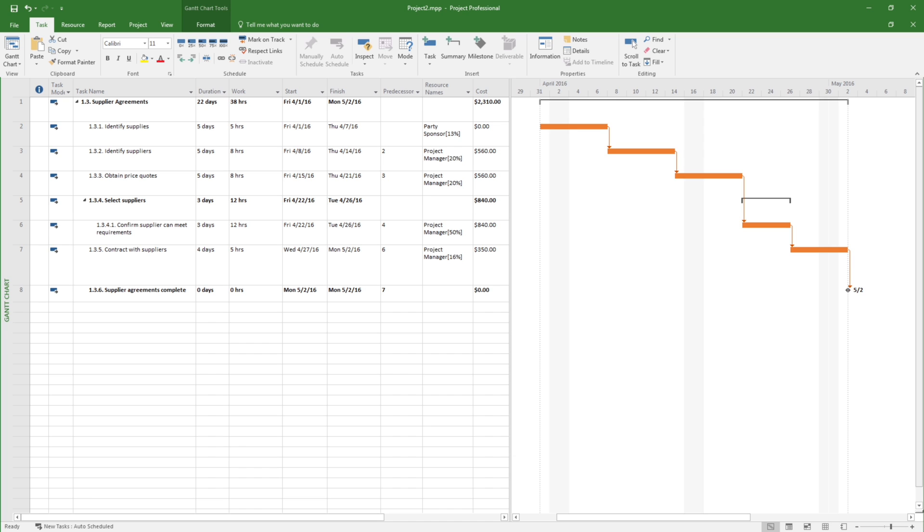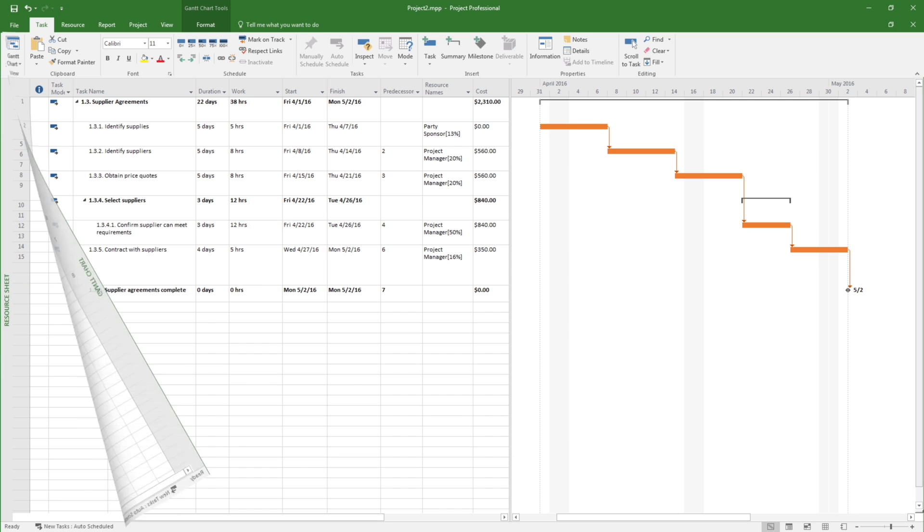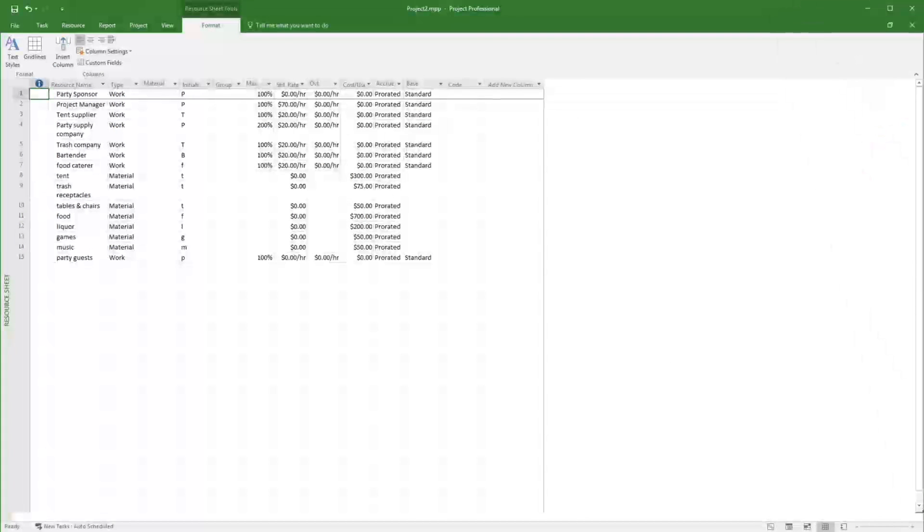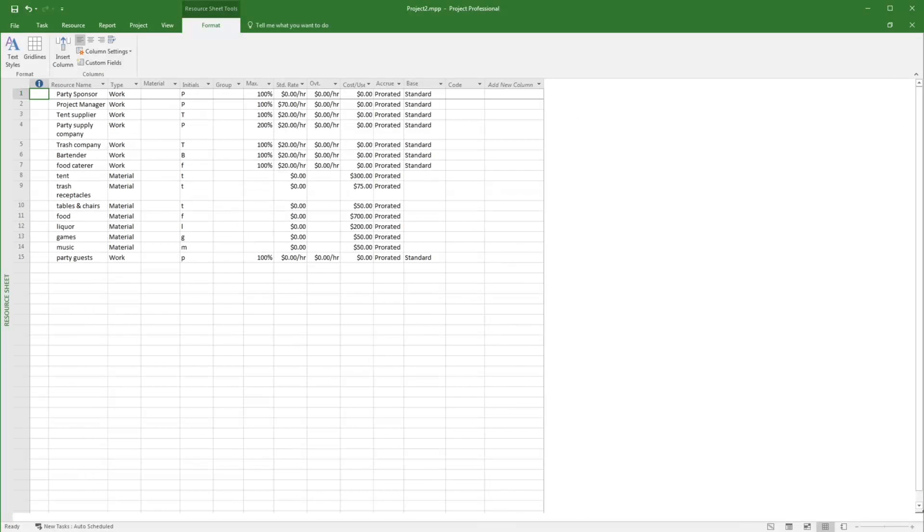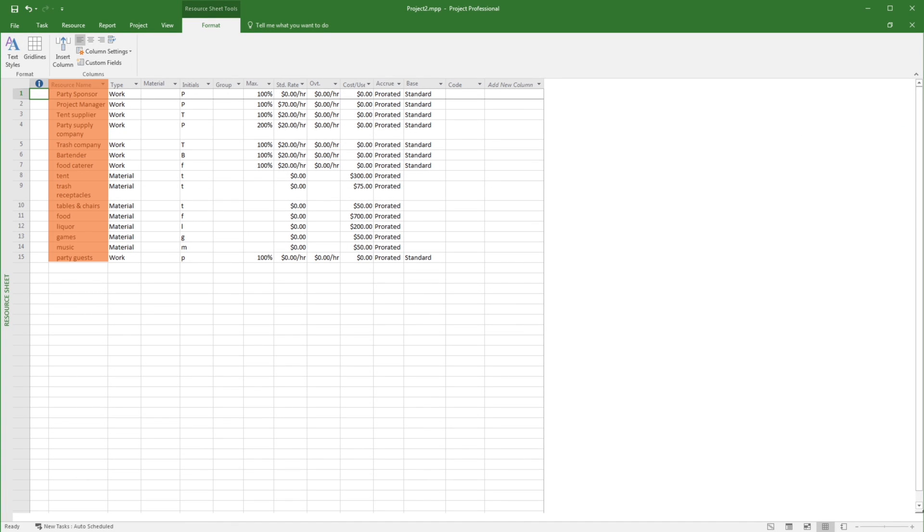In addition, a tool like Microsoft Project can also build the project budget based on input provided by the project manager by loading the resources and their associated costs.